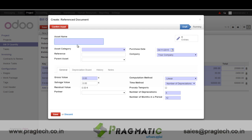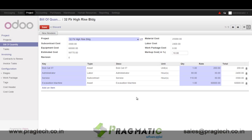The relevant information required is passed into the accounts as well. For example, I have a Bobcat of 5 tons. I can add it in my asset category as a moving asset. The moment I enter the gross value, the rental of this asset is automatically added to the cost head of the project. Now that I have added my Bobcat onto the project.